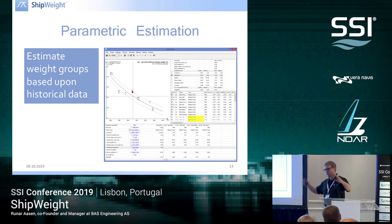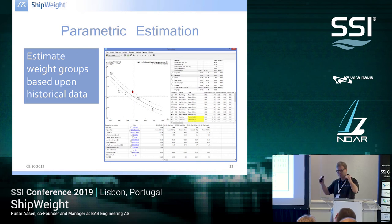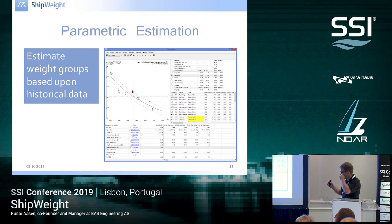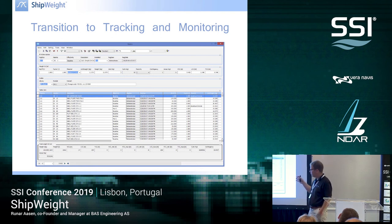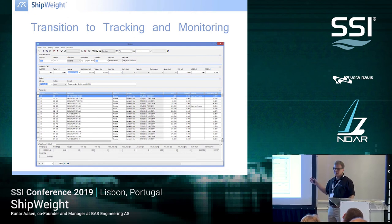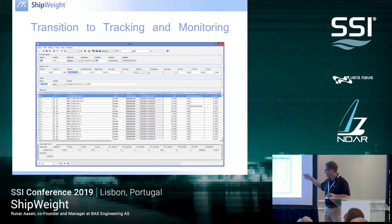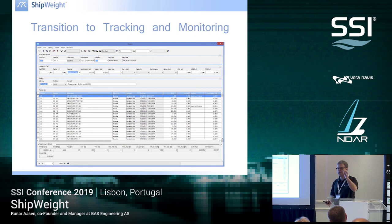We recommend a top-down approach: start at the top, first estimate the whole lightship, then divide into subgroups. We also have a system for keeping the top results and comparing them towards your more granular estimations. At some point you transition to tracking and monitoring and start to gather single weight items with more accurate data. You assign these items to a weight group, but you hang on to your parametric estimation value until you see that the list of items is more mature than your parametric estimation.